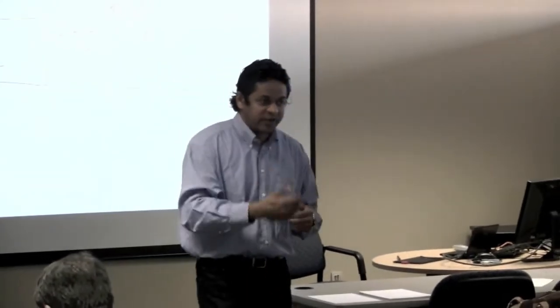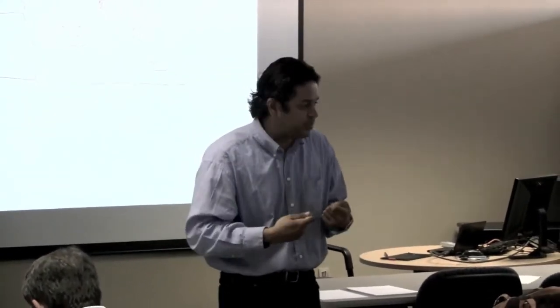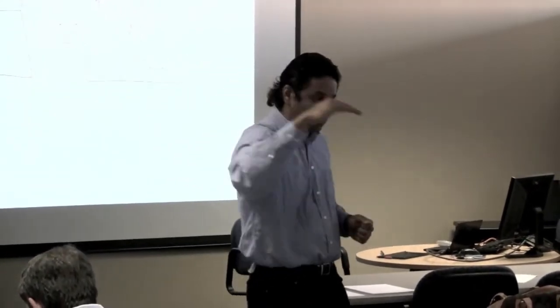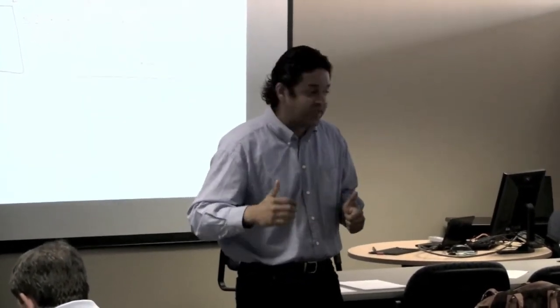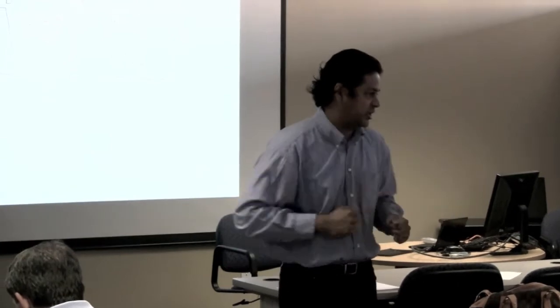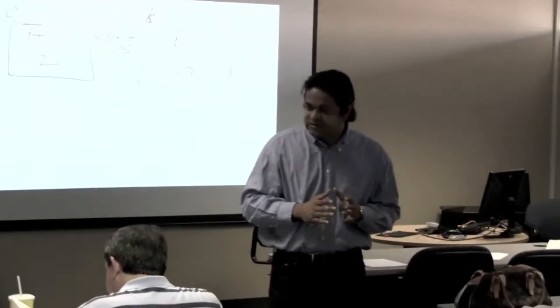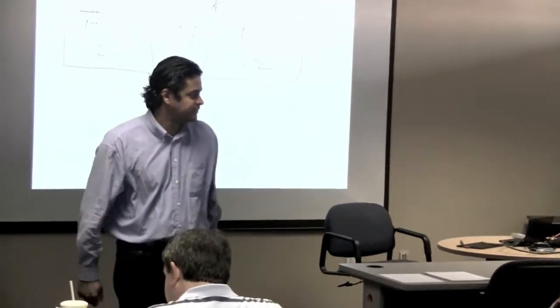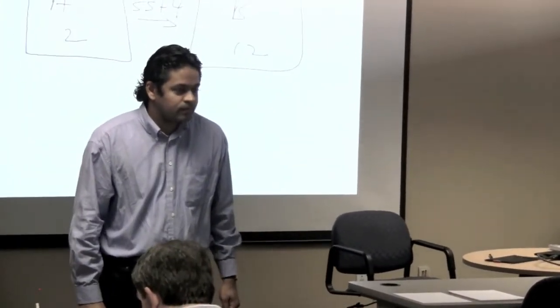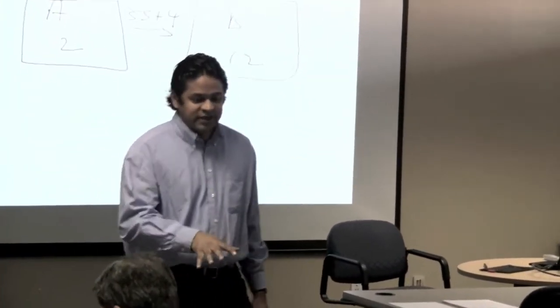Also, the other part is that the influence of a stakeholder, or the ability of a stakeholder to throw change into a project, steadily falls as you get toward the end of the project. The reason for that is because it becomes more expensive as time goes on to implement those changes. A stakeholder is anybody who is involved in or affected by a project. And they're going to ask you this on the exam.